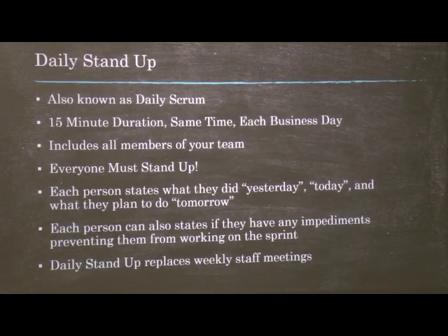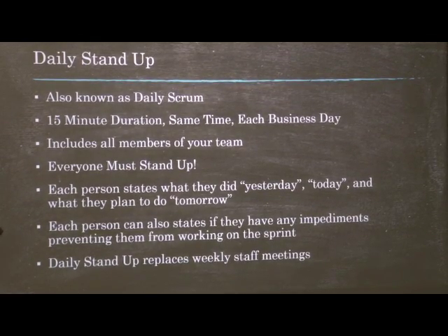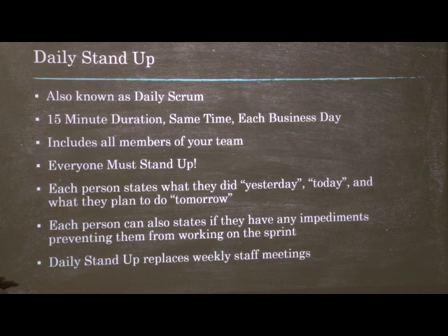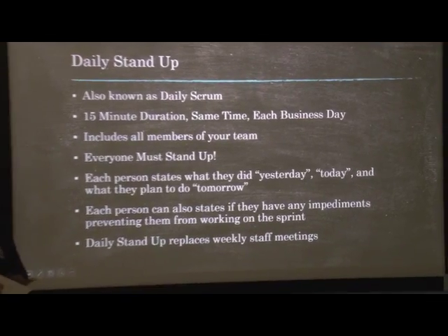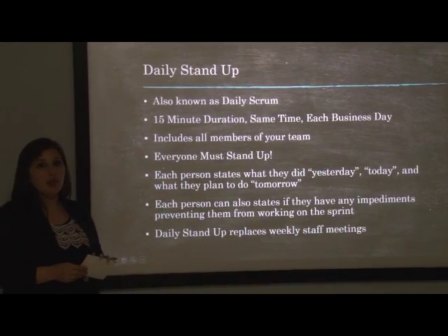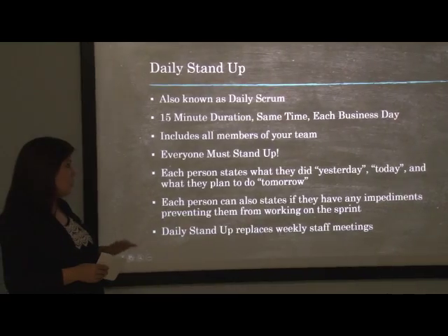So one of the biggest benefits of Scrum is the daily stand-up. It's also known as the daily Scrum. This is a 15-minute meeting that occurs at the same time every business day. It includes all members of your team, and all the members of the team must stand up. Each person states what they worked on yesterday, what they are going to work on today, and what they plan on working on tomorrow, and also if they have any impediments that are preventing them from working on the user stories of the sprint in order to meet the team's goals.